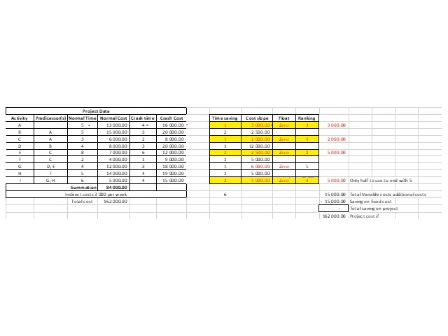Okay, and then we do that for the other ones on our critical path. So we look at C and identify, we've got a 2,000 rand difference here, and then for our next item we've got 5,000 overall divided by 2, so it's 2,500. And then we've got our other item highlighted on the critical path, G.